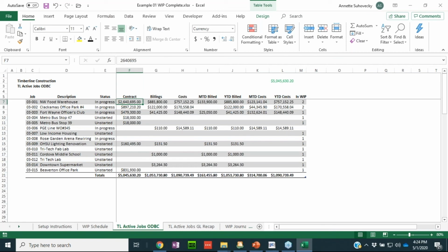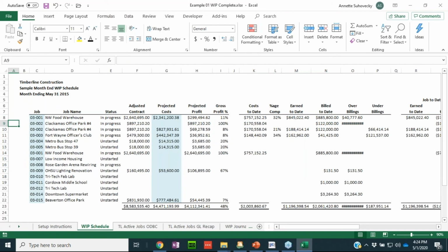Are the projected costs the same as the estimate out of job cost? No. Good question. In this particular example, we're using the percentage completion method. In the percentage completion method, we are basically looking at the costs that we've incurred to date, less the projected cost that we believe we're going to have on the job, and then we're using that ratio to recognize our income.